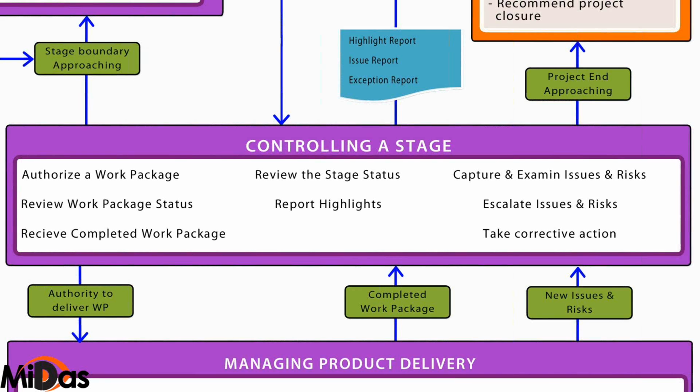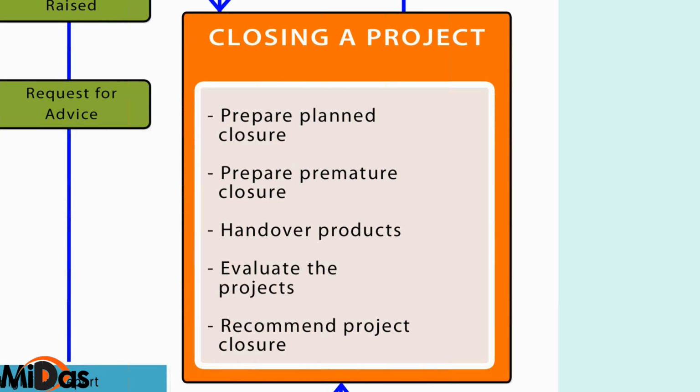Now you will hand over some products, if it is a planned closure, definitely. If it is a premature closure, now let's say you were working on something, but now you have been asked to close the project. There might be a situation where you started working on the keypad of the phone, but you have not completed it. But you feel that in future, if the organization or if any entity wants to do a similar project, they might require this product, or maybe this product can be refined and can be used within the scope of business as usual. So you would like to hand over those products as well, but with some follow-on actions that are required.